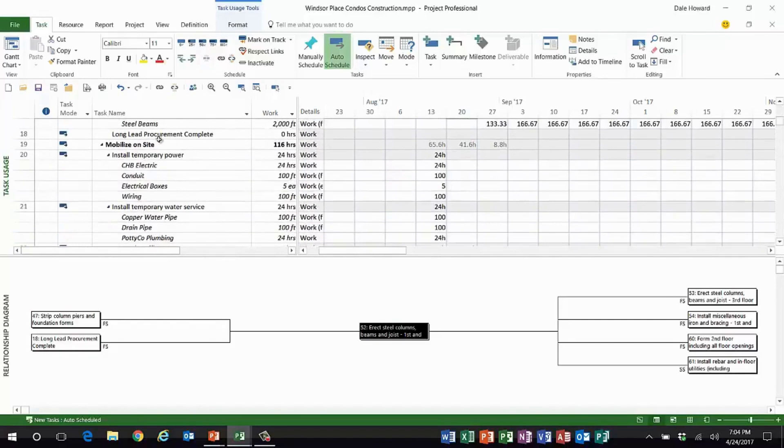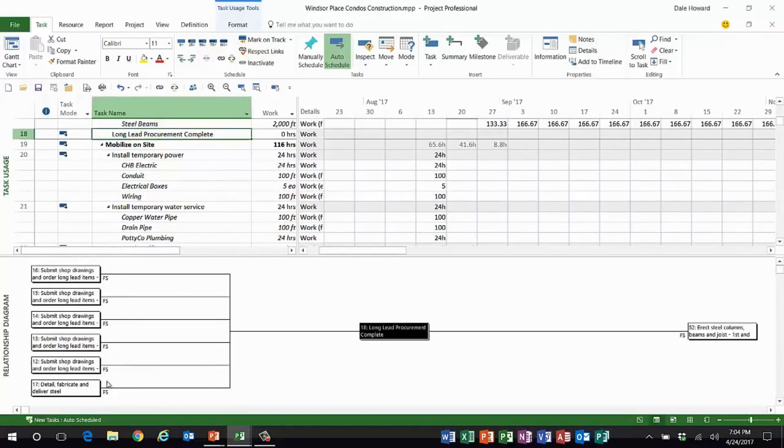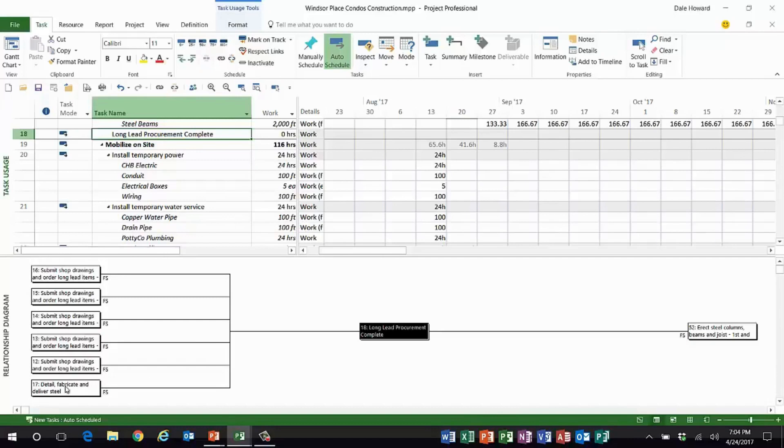Now let's go back up to task number 18. I'll show you more about how this works. Long lead procurement complete. Look, here are all of the predecessors, but the only trouble is I have no idea which one of these is actually the driving predecessor.